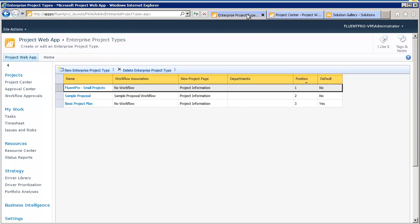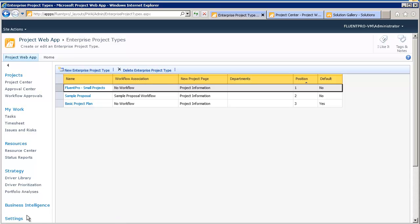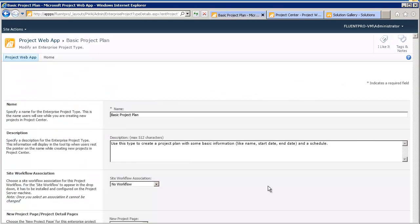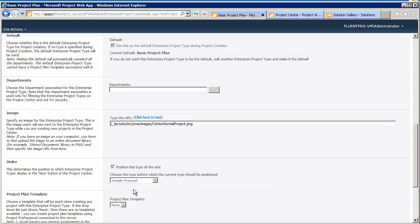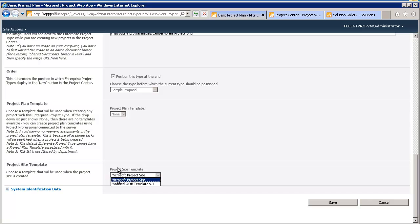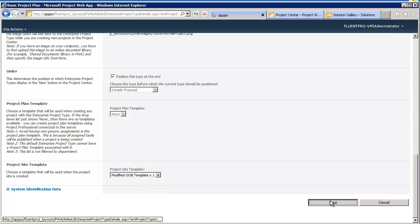Right now, we will go to the Enterprise Project Type in the Server Settings. And I will click on the Basic Project Plan. And I will see that we have in the Project Site Template drop-down, we have two options. The Default one and the Modified Out-of-the-box template version 1. So, I will save it.